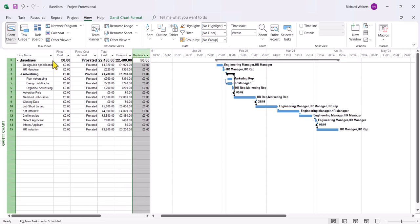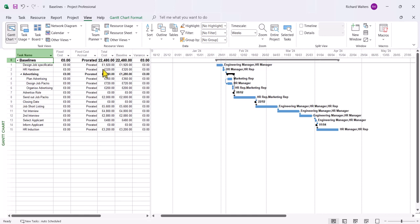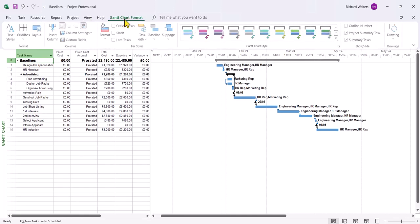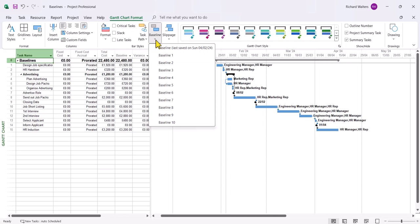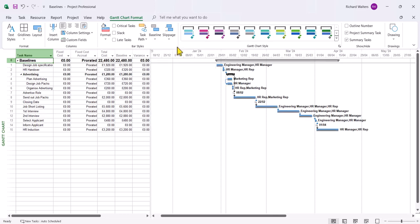So what I would do when you've got a baseline set, I would turn on the baseline graphic, which will go in the chart area of Gantt chart. So Gantt chart format tab, bar styles section of the ribbon, baseline arrow, baseline last save. So that's a measure where the grey bar will affect your dates. These are the dates you're agreeing to, any change, the blue and the grey will split. But we will make a change to cost first.